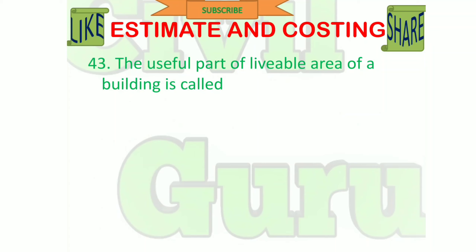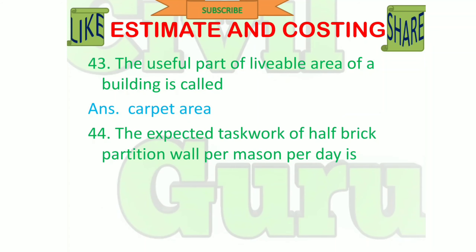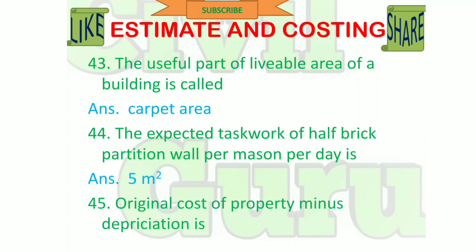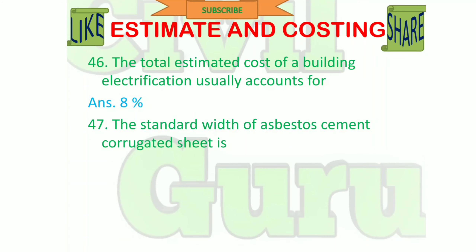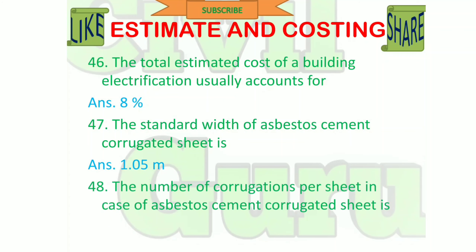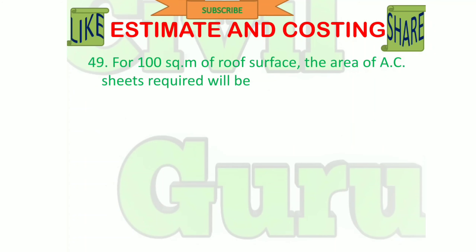The useful livable area of a building is called carpet area. The expected task work of half brick partition wall per mazdoor per day is 5 square meters. Original cost of property minus depreciation is book value. The total estimated cost of building electrification usually accounts for 8%. The standard width of asbestos cement corrugated sheet is 1.05 meters, with 7 corrugations per sheet. For 100 square meters of roof surface, the area of AC sheets required will be 115 square meters.